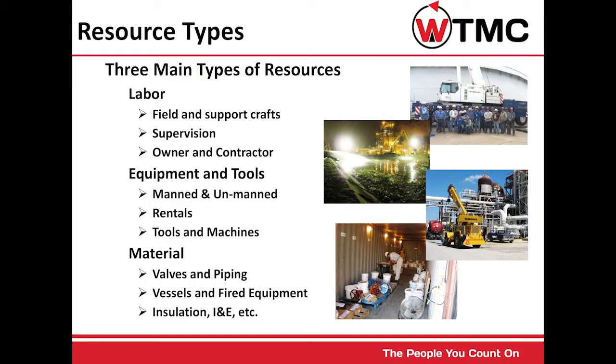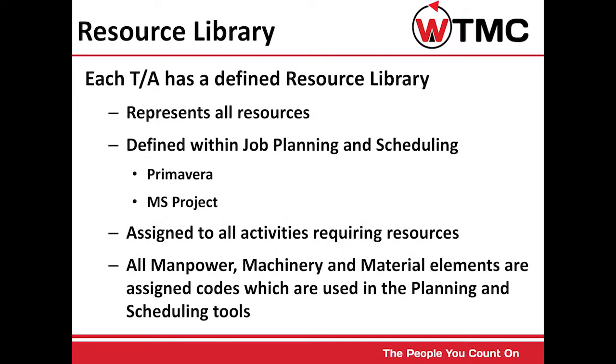Prior to developing the job plan, the turnaround team or planning department should create a common resource library for their site. Each turnaround has a defined resource library. It represents all resources.